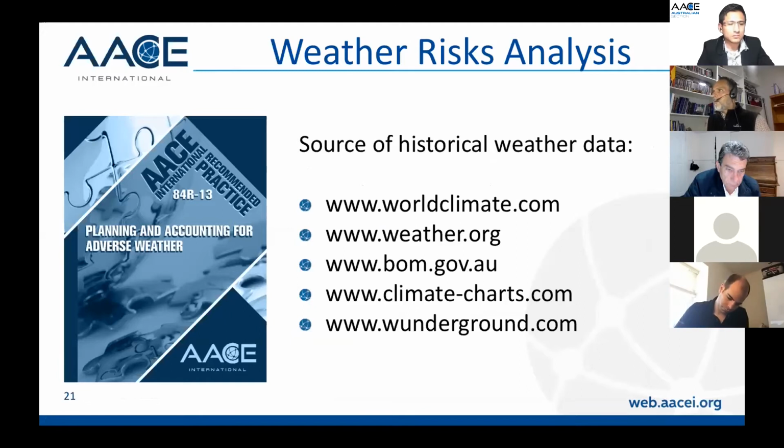Of course, every company has their own historical data. You need to understand whether the contract or the project allows you to claim time and cost compensation for weather events. I have been in projects where the client says, I need a dry schedule, and you get time or time and cost compensation for weather. If that's the case, you may not need to include this in your SRA. Otherwise, you need to have a look at what is the potential impact.